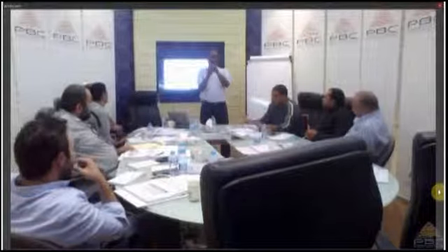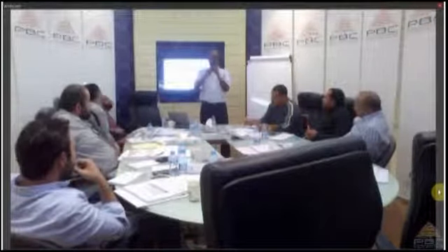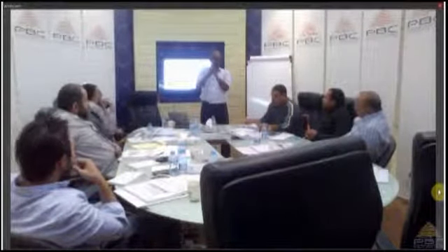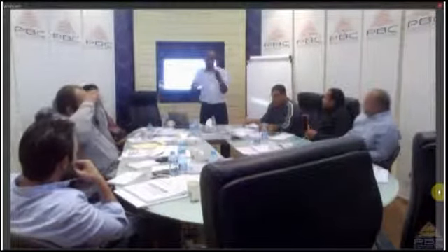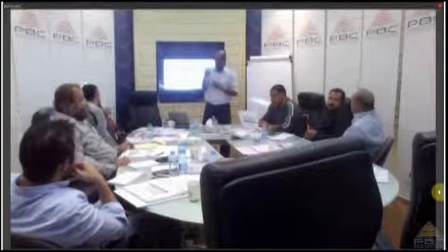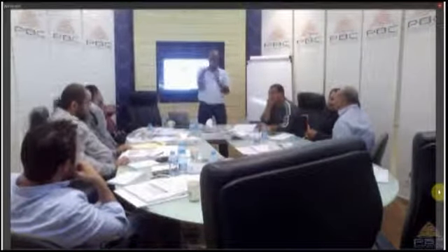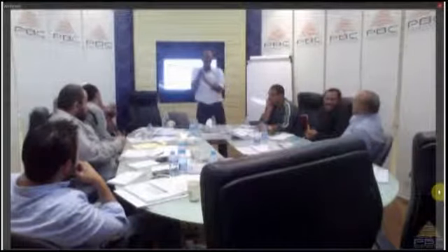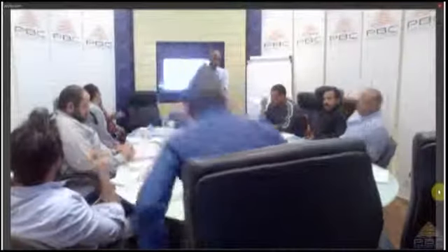if you want to recruit the best technician, you have interviews, you have tests, you have CV screening. All these are prevention costs. Prevention, because you want to make sure that this person who will come in will not make any mistake. You don't want any mistake to happen. So these are called prevention costs.